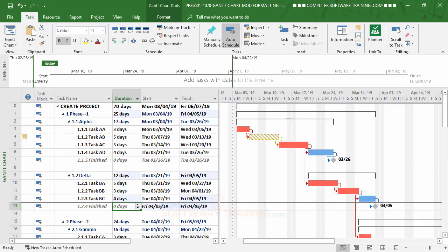And then we've got some other related features as well that I want to cover too. So I want to start out first of all with changing our relationship a little bit. Now, when you look at task AB here, when it gets done, then the next task starts. The problem in that situation is, and I know all these are imaginary tasks, so they aren't really relating to anything other than just something in general. But just imagine that when you are waiting to begin this particular task, you got to wait until this one is done. And what if that particular task can actually start at the same time this one starts? So in essence, when this one starts, this one starts.